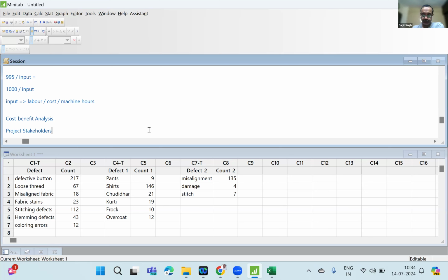Yes. 5 members, every day they are spending 2 hours. Their salary you account for. And whatever the raw material cost and machine cost, current electricity, whatever you want to add, you add. Right? So cost benefit analysis is part of your improve phase. We'll do that in a detailed manner at that time.